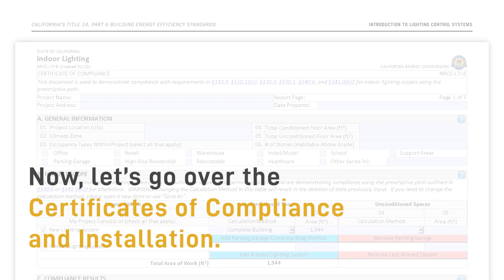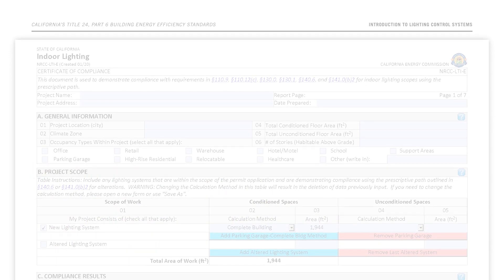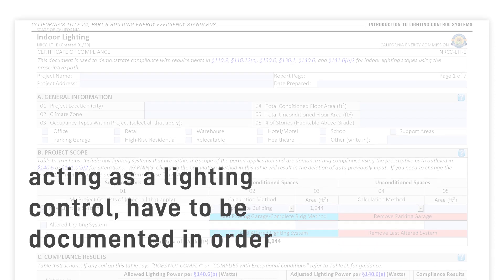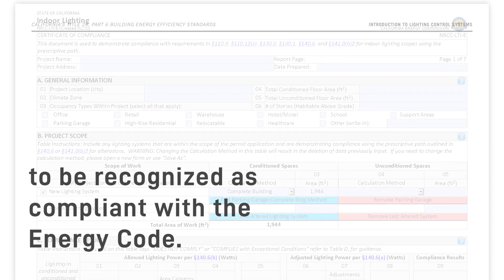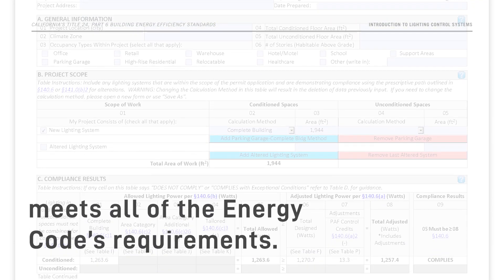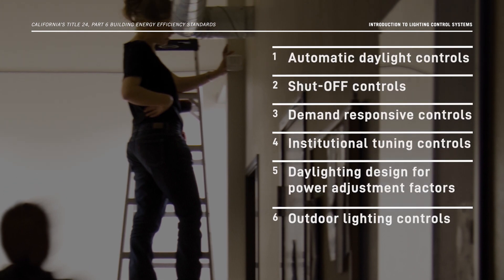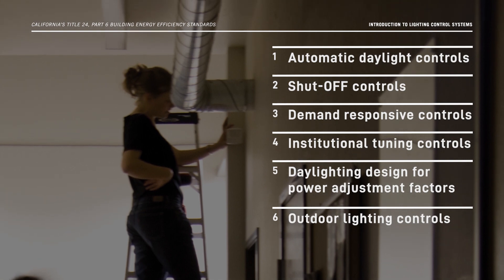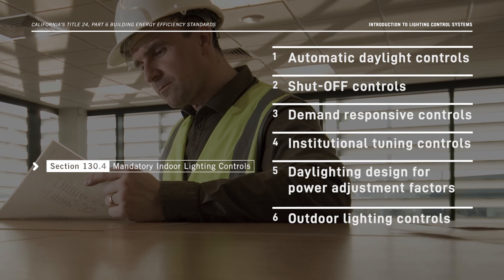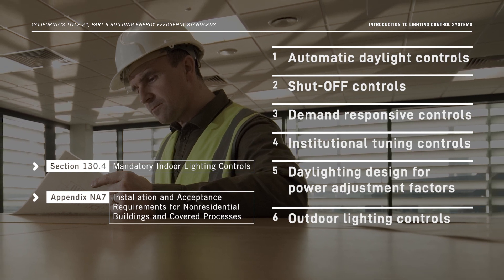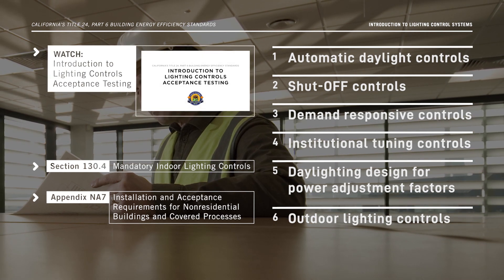Now let's go over the certificates of compliance and installation. A lighting control system, including energy management control systems acting as a lighting control, have to be documented in order to be recognized as compliant with the Energy Code. The certificate confirms that the installed control system meets all of the Energy Code's requirements. The Energy Code requires that automatic controls undergo acceptance testing after installation and before an occupancy permit is issued. You can find more on acceptance test requirements in section 130.4 of the Energy Code and Non-Residential Reference Appendix 7, as well as our Introduction to Lighting Controls Acceptance Testing video.